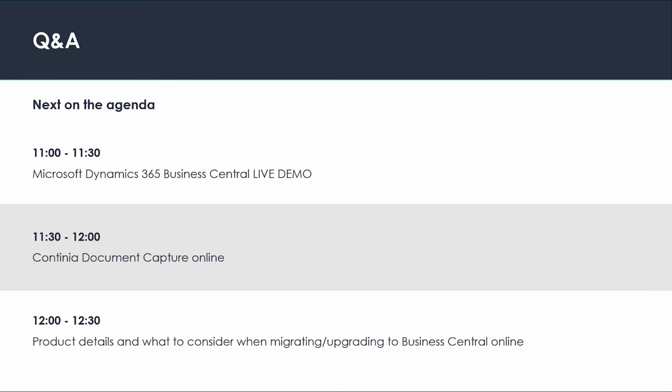Mm-hmm. Yeah, there is one point which actually follows up on this one. So have you migrated historical data? No, not really. We left it in the legacy system, and it's also my experience that it's a lot of work and a lot of hassle to really bring your historical data with you, because that also means that you need to bring the old master data with you, and you really would like to avoid that, and you want to start with a clean, fresh system.